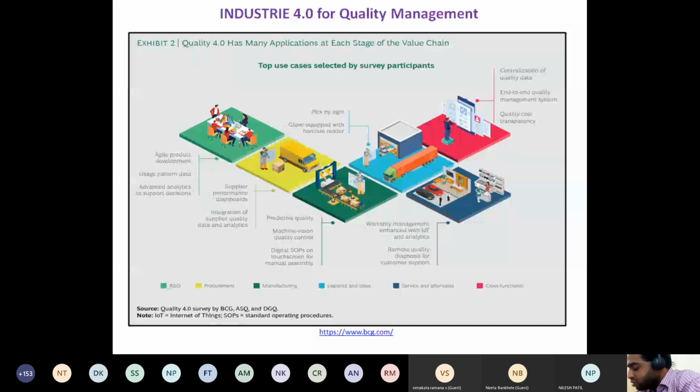The initiative owed its success to three building blocks: a well-crafted change management plan to promote organizational buy-in, top management support, and external assistance in building capabilities. The impressive array of benefits included delivering projects within 50% of the traditional lead time, avoiding the typical 30% of cost overruns, and boosting morale.